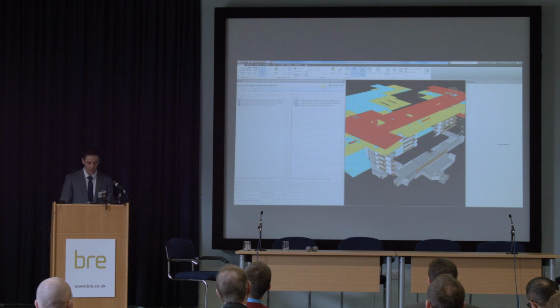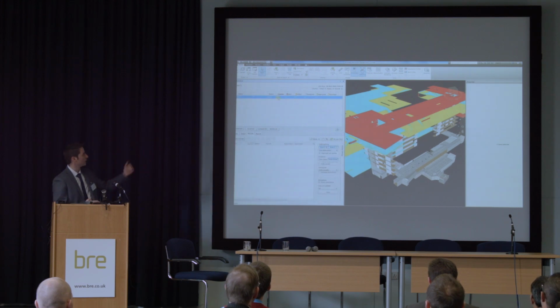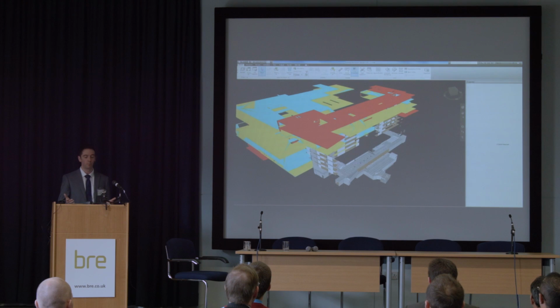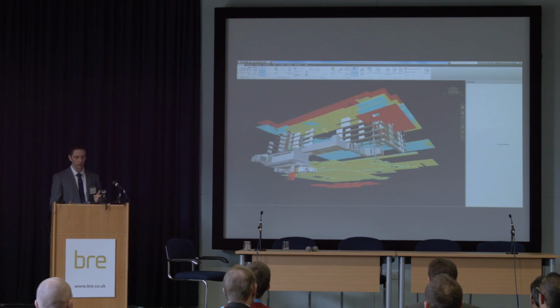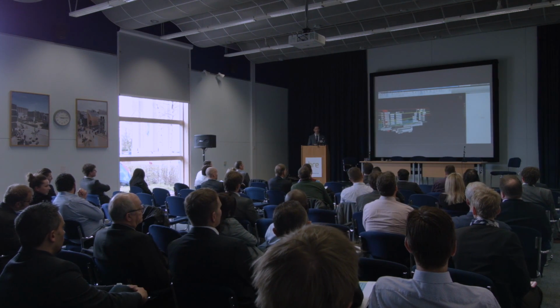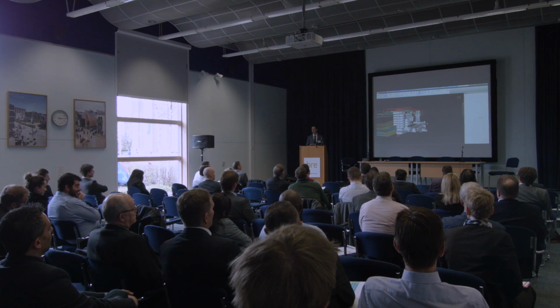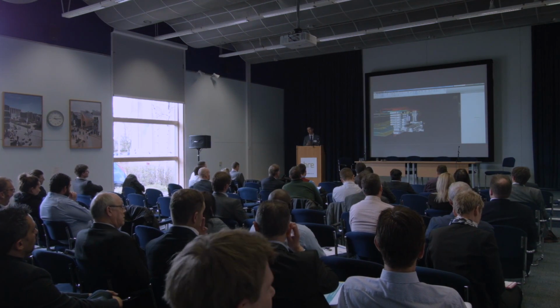If I'm not completely satisfied, I can quickly pull up the clash detective. And this is a fairly quick example, rough and ready. So it's just a clash detection to 10 mil. So I take the two models, run a clash test. There you go, zero clashes. So just from 30 seconds worth of checking, I can see that the changes in the models that have been issued don't actually touch or affect my package contractors. If they do, then I can investigate a little bit further and report it to the package contractor and say, these are the changes, are there commercial issues?